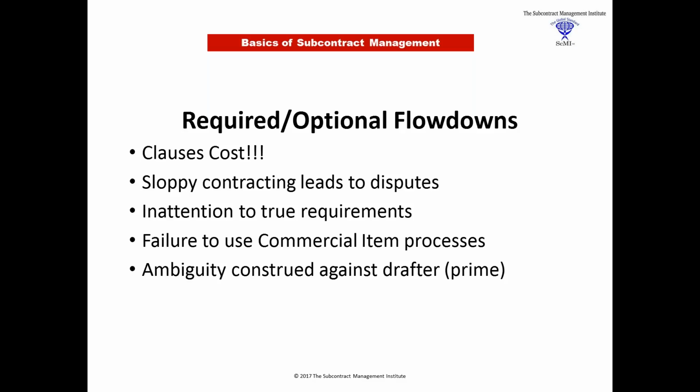If you look at FAR 52.212-4, I believe it is, today, you might be fascinated to discover that there are now 20 clauses that must be sent into a commercial item simplified acquisition contract. From 4 to 20 in just a couple of decades. Now, granted, some of those have come out of executive orders. One of them is under an injunction by a court in Texas, and some of the others may be undone by future executive orders. But as it stands today, there are 20 clauses in the simplified commercial item contract.